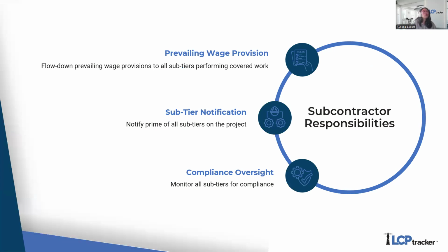Let's talk about subcontractors. What are their responsibilities? They are responsible for, again, providing the 29 CFR 5.5 verbiage in all of their subcontracts as well. So they need to make sure that they're writing it in Sharpie on their arms or on their firstborn child's head. Okay. In addition, if they have any subcontractors that they decide they want to add on to the job site, they have a responsibility for letting their primes know, hey, I'm bringing in someone else to the job as well. FYI, wanted to let you know. In addition, they need to make sure that they're monitoring all of their sub-tiers for compliance too.